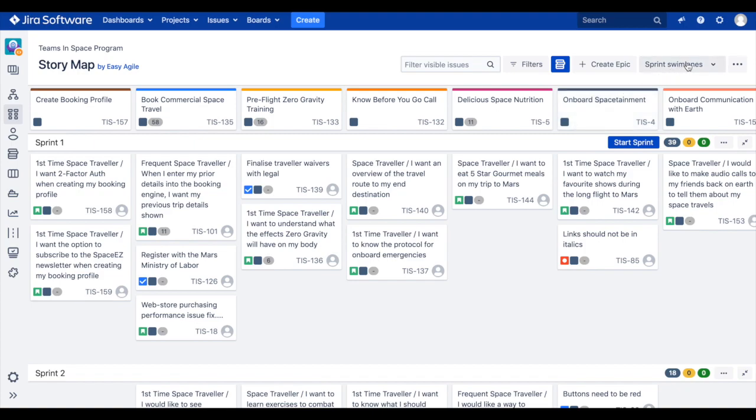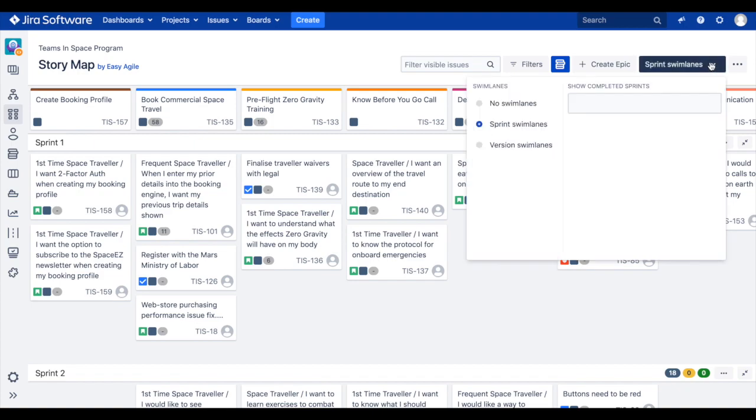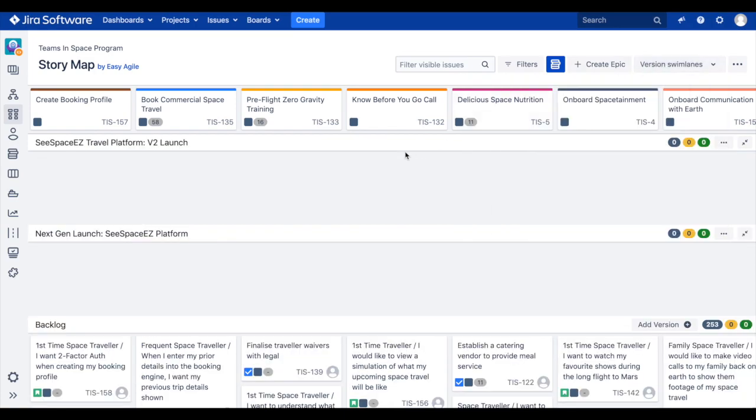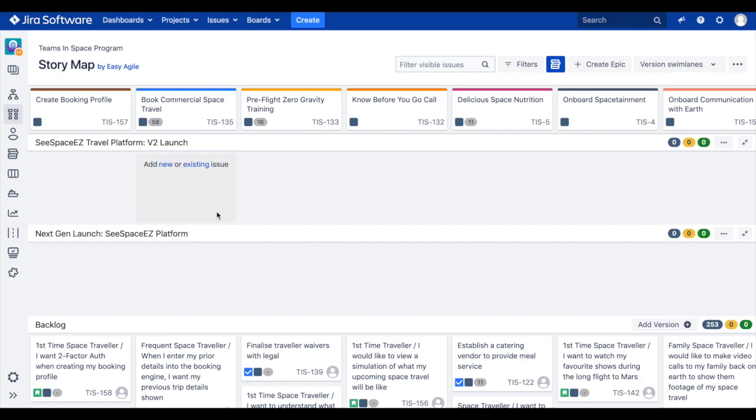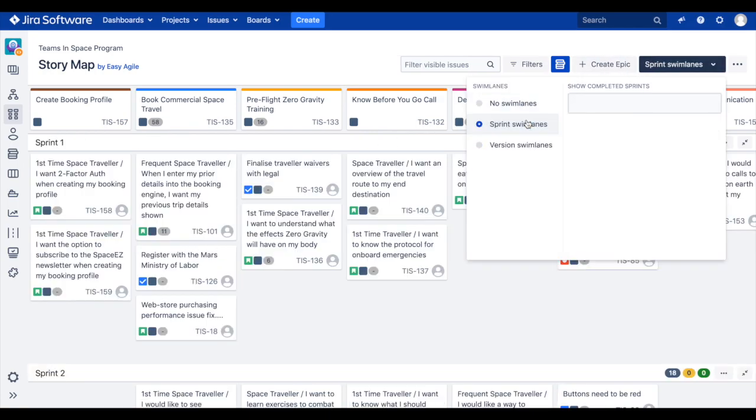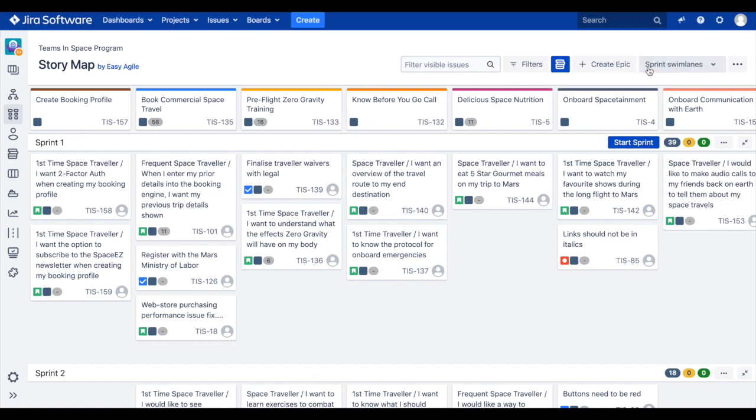Scrum teams will also have the ability to switch between sprint and version swim lanes on their story map via the swim lanes drop-down. Alternatively, when a Kanban team first opens their story map, they will see it sliced horizontally by version swim lanes pulled directly from their releases page in JIRA. The versions are ordered by their release date on the story map.